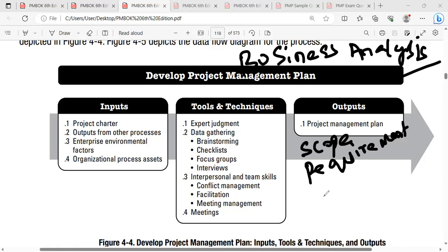So someone has to be nominated from the predictive project side. They have to send this particular person to the client or the owner to know the complete specifications, to collect the complete requirements. It can be the business requirements, the stakeholder requirements, the procurement requirements, functional requirements, non-functional requirements, solution requirements, quality requirements. If the client is going to give quality requirements, the client is going to say that my product has to work 365 days without defect. You need to bring a product that should not have any defect for 365 days. So you need to collect this kind of requirements. So you need to push someone from your side to collect the requirements.